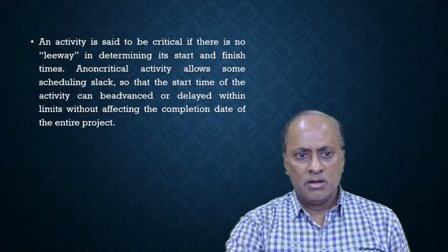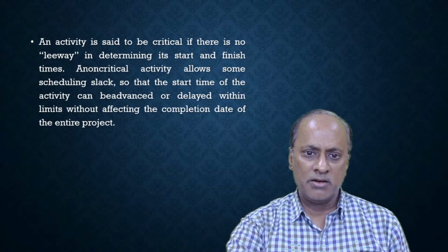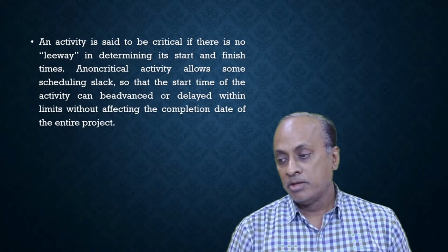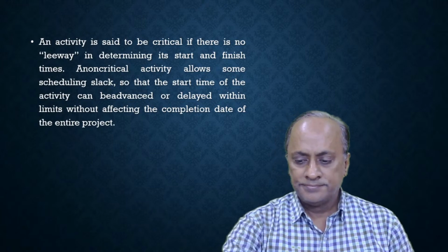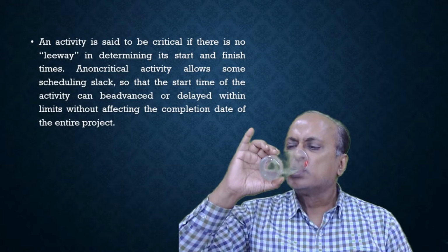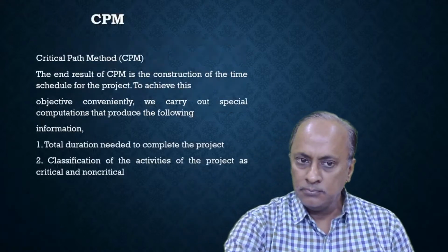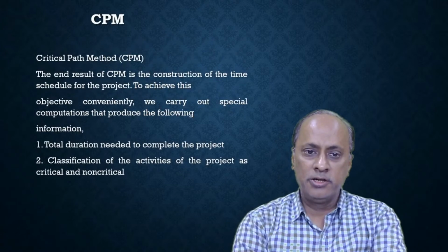And a non-critical activity allows some scheduling slack. So the start time of the activity can be advanced or delayed within limits without affecting the completion date of the entire project. So here two things are very important.